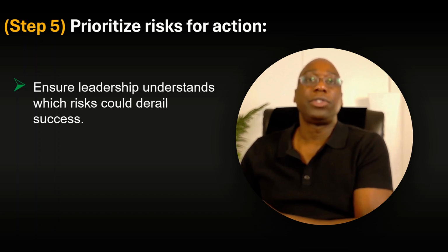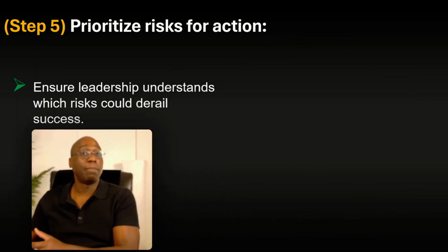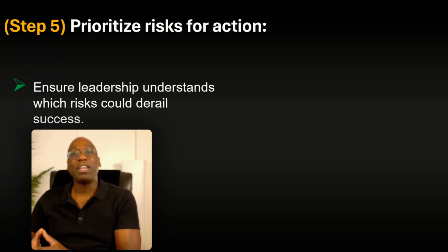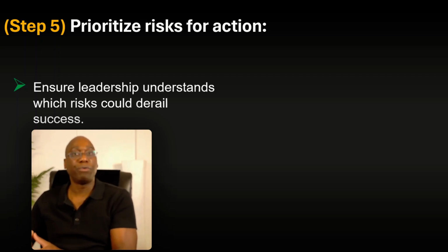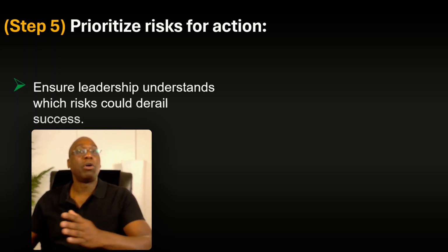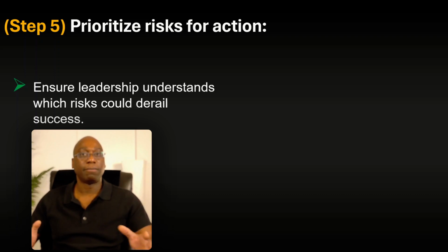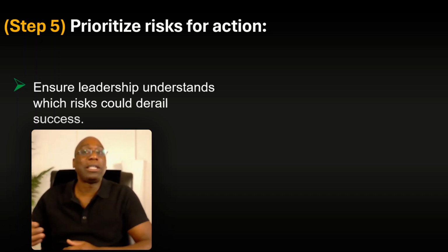Every risk needs to be mitigated to some extent or the other. In other words, you cannot ignore a risk just because it is low risk. But when presenting to your leadership, don't overwhelm them with all of the risk. Focus on the high risk and also mention, for example, you could say, hey, we also have 20 low or medium risk that we've identified.